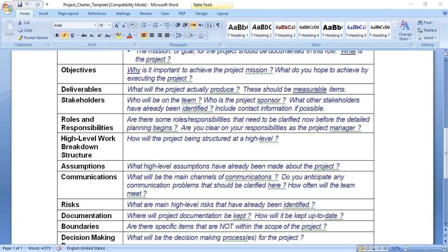We have assumption, for example, for the total cost or the capital cost. We have to enter the total cost of getting the project up and running. It could include cost of hardware or purchase software, programming cost, salaries, operational cost. This is a maintenance cost, would include ongoing license fees or maintenance fees.